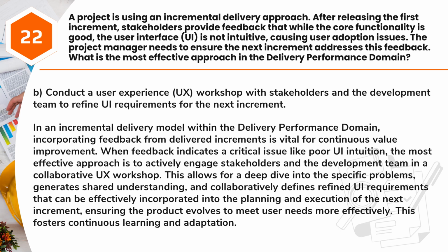Answer: B. Conduct a user experience (UX) workshop with stakeholders and the development team to refine UI requirements for the next increment. In an incremental delivery model within the delivery performance domain, incorporating feedback from delivered increments is vital for continuous value improvement. When feedback indicates a critical issue like poor UI intuition, the most effective approach is to actively engage stakeholders and the development team in a collaborative UX workshop.